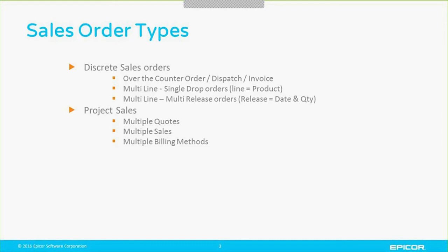I may want to do some elements on delivery of product. I want to do some on the basis of milestones. So the system needs to allow me to break up the body of work into estimating groups that is then taken through and done out into sales orders against a singular project with billing methods that suit the type of work, the type of service, the type of product that's being delivered in that phase of the project.